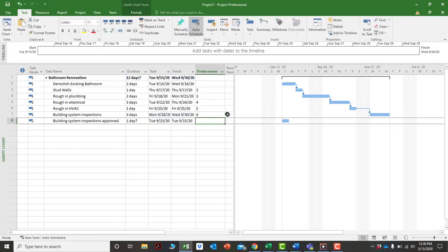And so that would be much more clean in this example because really what I've said is this has to be done before I start that. That has to be done before I start that. And this has to be done before I start that. So it follows that process, whereas before I had them, this has to be done, that has to be done, and then these all have to be done. But I really had said it when I had these linked one after the other.